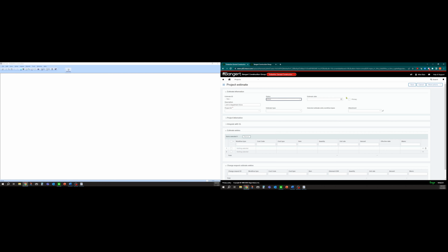You check off which one's going to be your primary budget, but you can see here for estimate types, you can set up as many different estimate types as you like. You can have forecasting, original, revised estimates. So maybe you have your bid estimate versus your buyout estimate, and you can report on all of those in comparison to your actuals and your committed. So you can have as many of these budget types as you want in the system. So that's why you have this header information.